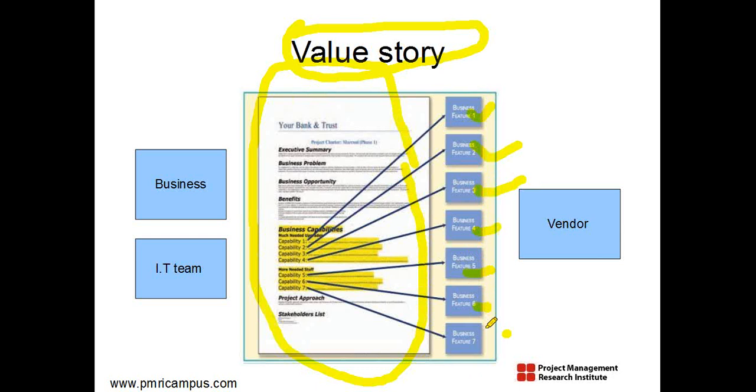And we may not give a commitment to the customer for delivering all the value stories together. First we say, okay, let us work only on this, that is top priority. This may comprise, let's say, 20 user stories. So if you do all those 20 user stories and then roll out the solution, then here the customer can decide whether the second value story should come to you or not. So this gets incremented value story by value story.